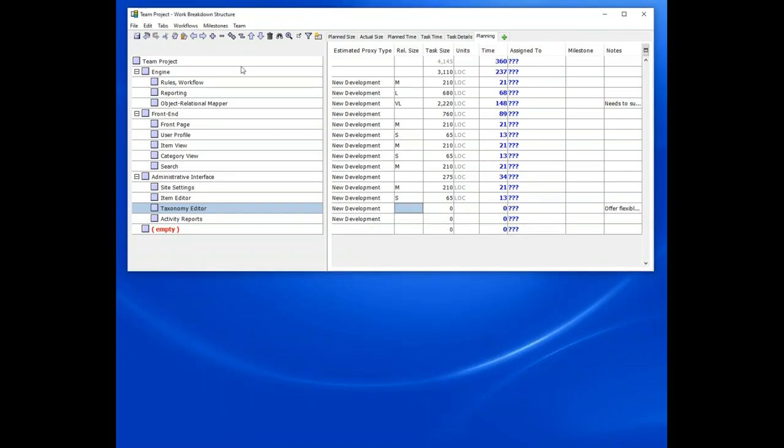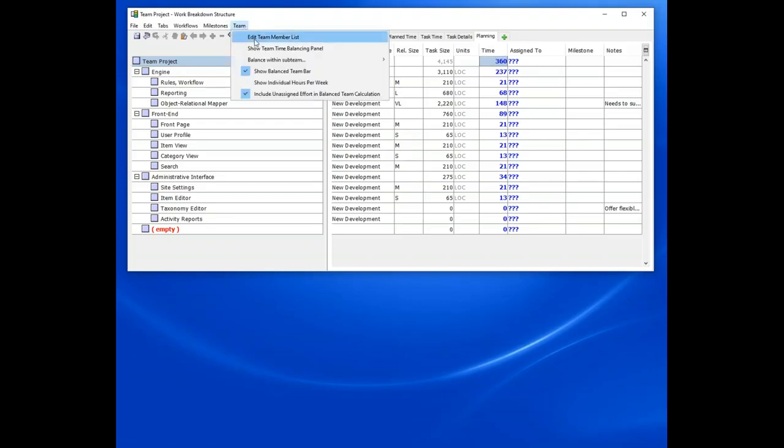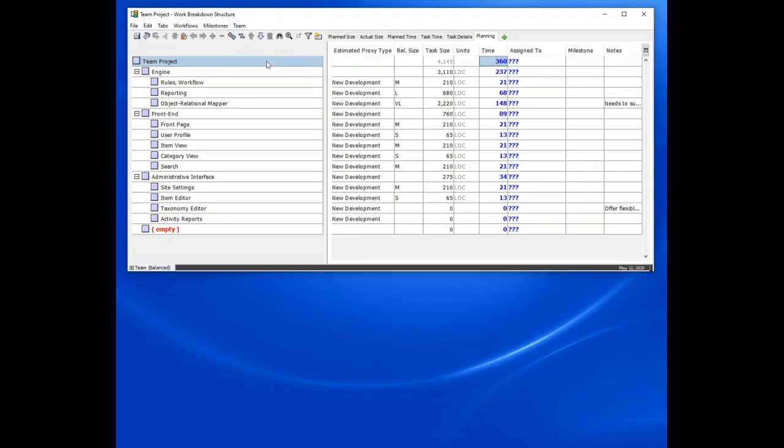One of the things that's also useful is as we make changes, the WBS Editor is looking at the time estimates that we produce, and it's comparing them to the calendar that we put in for the team, and it's calculating a particular possible planned completion date for the project. We can show this as an example right now. It's saying that the project might be estimated to finish on May 12th. As we change numbers or enter numbers, you'll see May 23rd, May 24th, that these numbers dynamically update in real time.